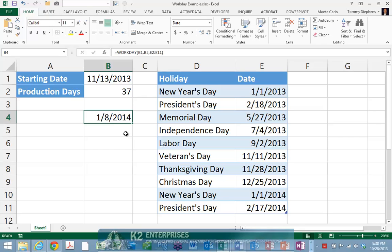Excel's Workday function returns a date that is the indicated number of working days, excluding weekends and any dates specified as holidays, before or after the starting date. In the example shown, using Workday allows you to estimate quickly the completion date of a project that begins on November 13, 2013, that is expected to consume 37 production days, and in which your production facility will not work on scheduled holidays.